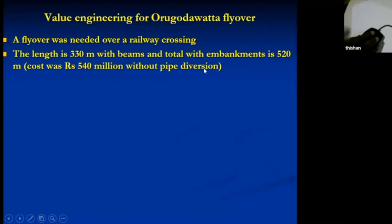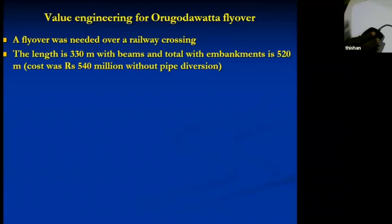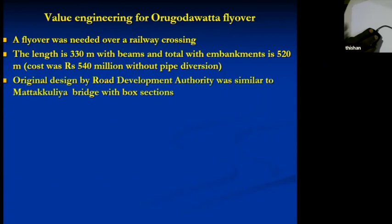The cost of pipe diversion was 260 million. The contractor proposed using 4 piles of 1.2 meter diameter instead of 10 piles of 1 meter diameter. So the number of piles was reduced from 10 to 4, but when you do that, there are many other problems to solve. I'll briefly explain the various problems we encountered and how those were solved.